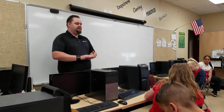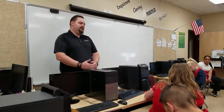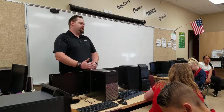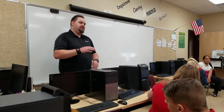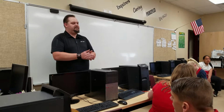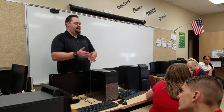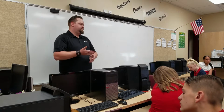And then we have to schedule our inspections online through whatever city we're at. They'll have a different way of scheduling their inspectors, and we have to track all of that. So whatever inspector we have on site, throughout the project, there's different entities that we have to make sure the city passes off on. They do their quality check as we do ours. And so if it doesn't pass with the city, we don't move on.